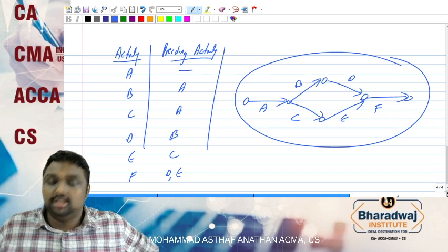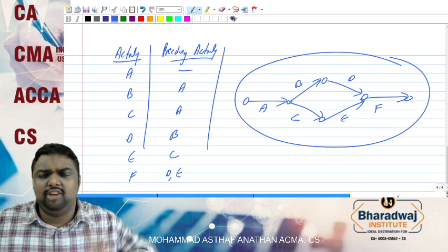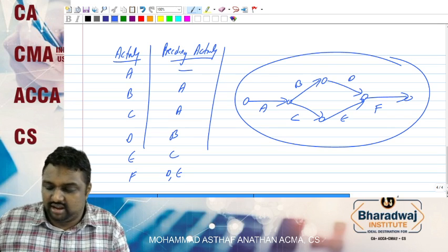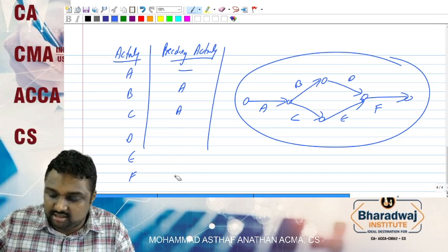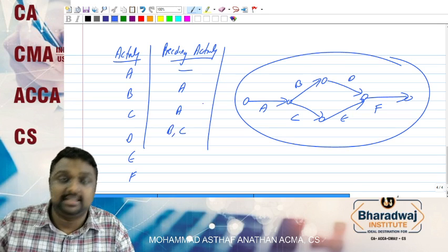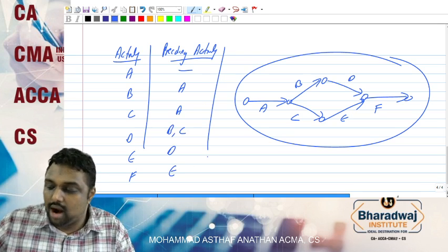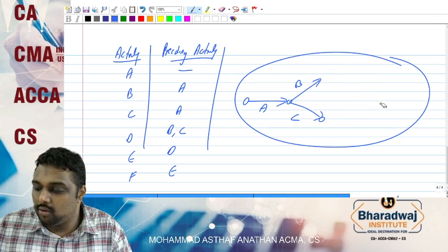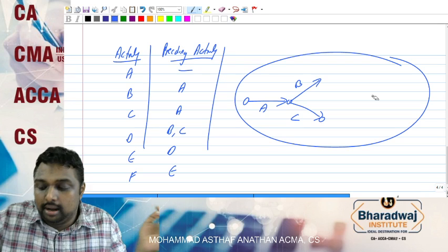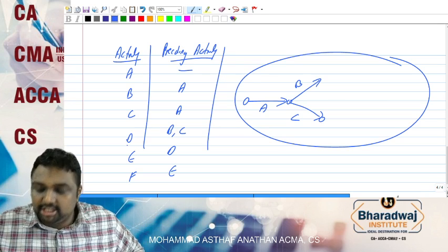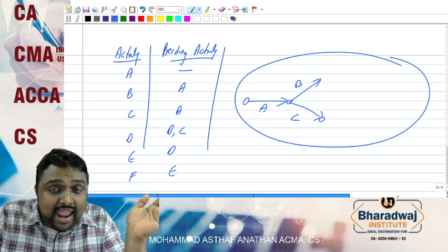So this is merging and bursting. Now I will tell you the advanced level. Already you learned everything in your intermediate level, but anyway we will discuss. Now bursting, then merging. Suppose D starts from both B and C, E goes from D, and F goes from E. Here, my dear friends, you already have bursting because A bursts into B and C. The same B and C are merging to create an activity called D. That means bursting happened, and at the same time merging comes.